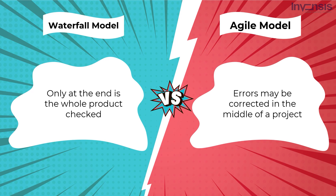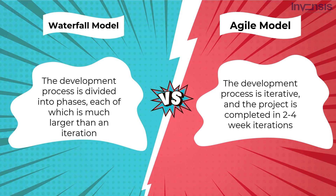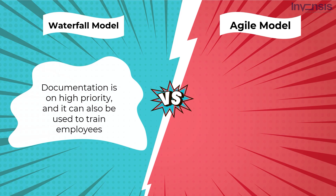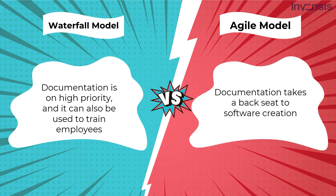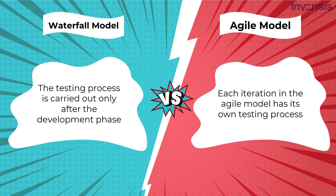In an Agile model, errors may be corrected in the middle of a project. In the Waterfall model, the development process is divided into phases each much larger than an iteration, whereas the Agile model has every process concluding with a thorough overview of the next phase, completed in two to four-week iterations. Documentation is a high priority in the Waterfall model and can be used to train employees. Documentation takes a backseat in Agile. Testing in Waterfall is carried out only after the development phase, while each Agile iteration has its own testing process, enabling regression testing whenever new functions are announced.